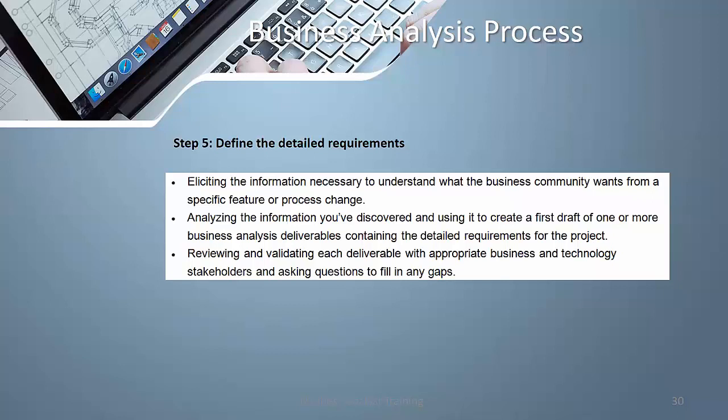So if you have to go back to the person, it can take a week to reply. Now your technology team is sitting idle for a week, right? They have nothing to do for a week, right? So you don't want to end up in that situation. Okay, that's why you need to get the detailed requirements from your customer.